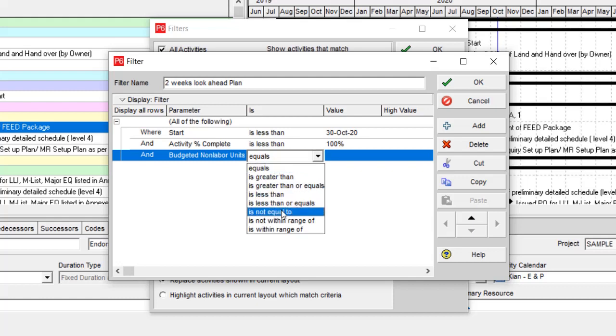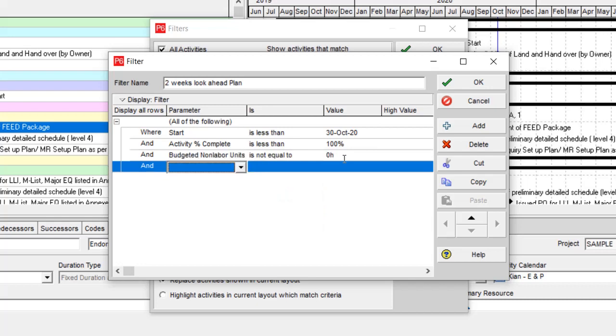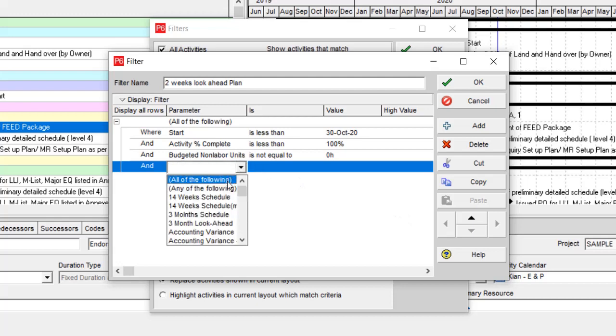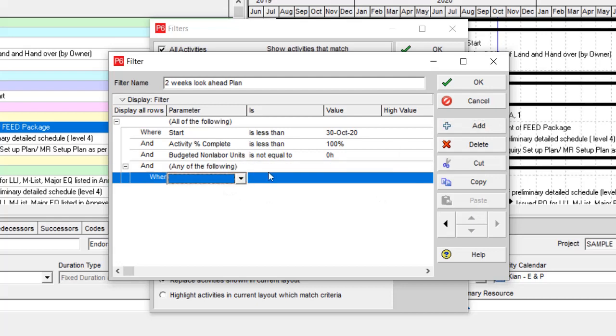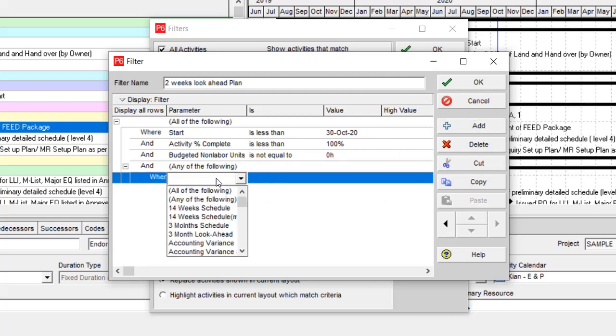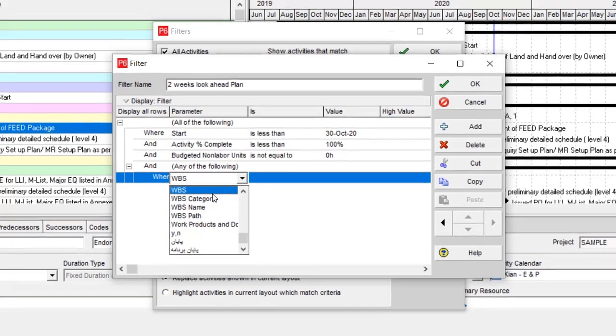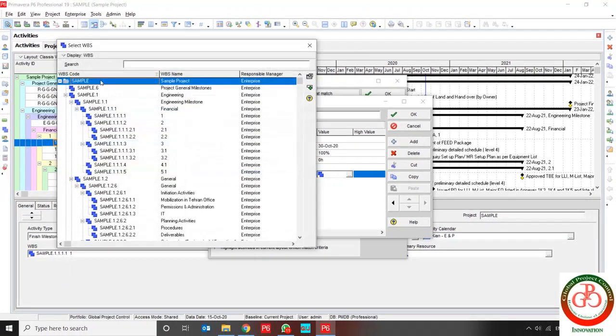If I want to focus on a specific part of my WBS, I should prepare a WBS filter, for instance, only under general activities of my engineering program or my procurement.